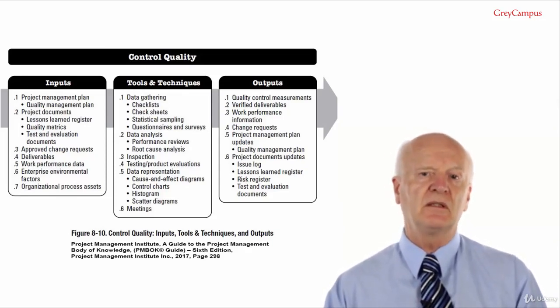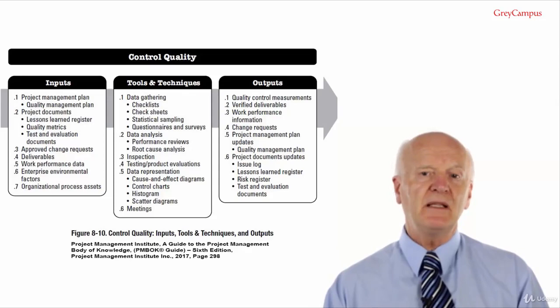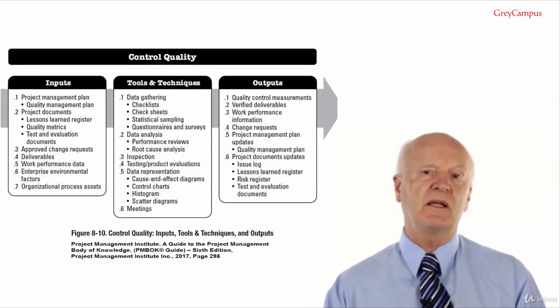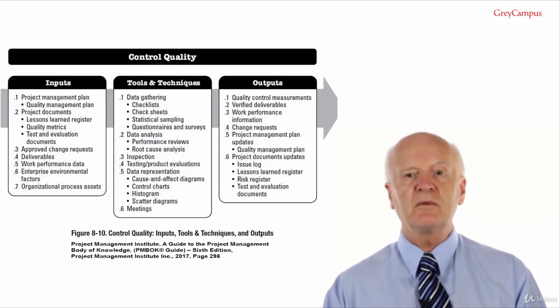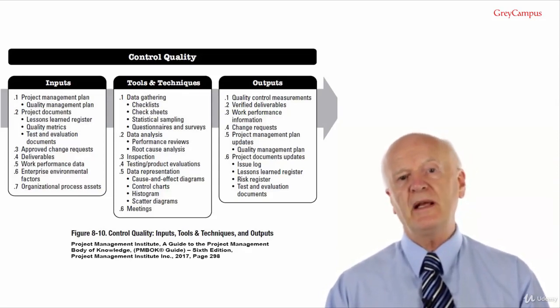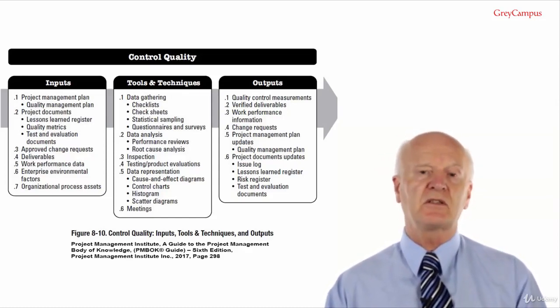I've worked in projects where stakeholders believed that submitting a change request would mean it was automatically implemented. Then they'd complain that the product didn't match the scope. And I've worked on projects where the team members thought that scope is set in stone and didn't realise it can be changed through change control.